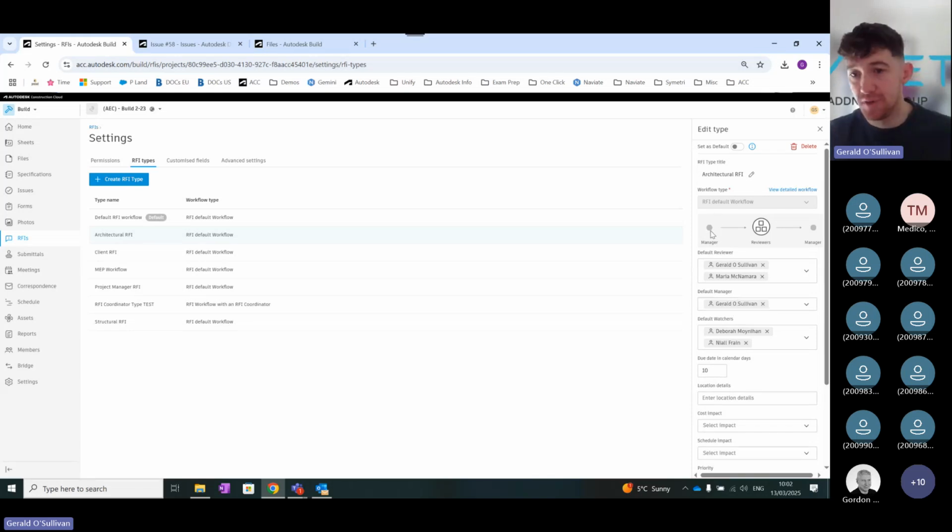I need to come in and do this first step, and then I need to assign it to the reviewers, which are going to be these two individuals. And once these two then fill out that review stage, it's going to come back to me to distribute that. All right, so again, you can fill out the workflows of each of these as you go through.